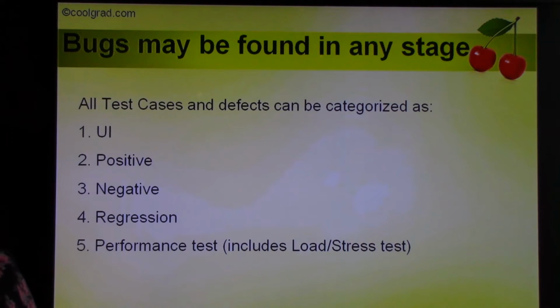Then we have to do the needful. We have to fix the defect to make it behave the way it was supposed to behave. So in any organization, quality assurance assumes at least 33% of the time taken in the entire project life cycle. It could be anywhere from 30 to 50%. I've seen projects where 50% of the work was all about testing and defect management. It's really a very critical and important aspect of any project life cycle.